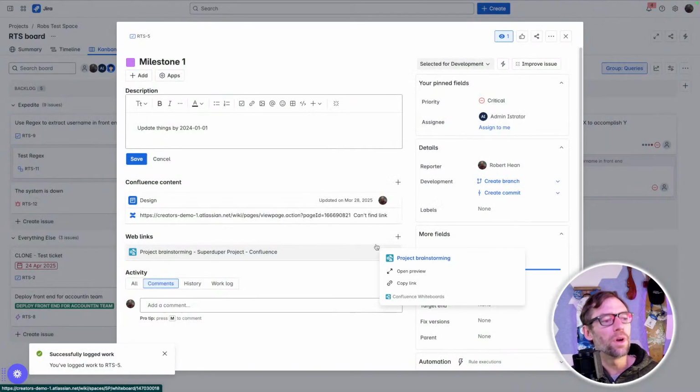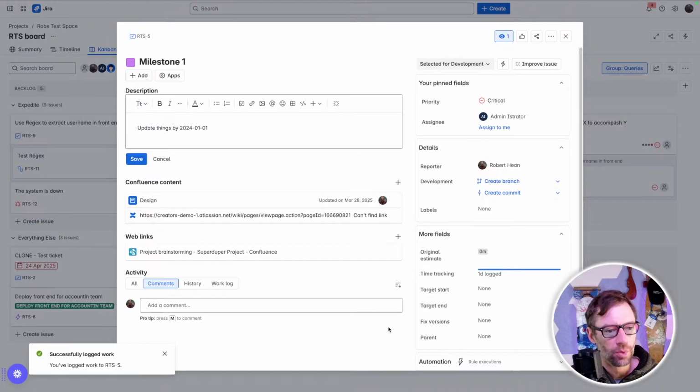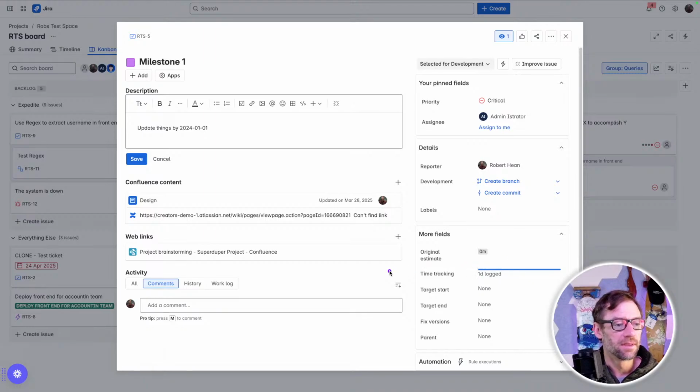And so this is one way for my team to track what's happened. How long did this thing actually take? Now, if you're using Agile, this is not a story point. Whatever you do, time is not a story point. But this is one way to track the amount of time work takes in Jira. So again, that's the Q key, or just clicking on time tracking.